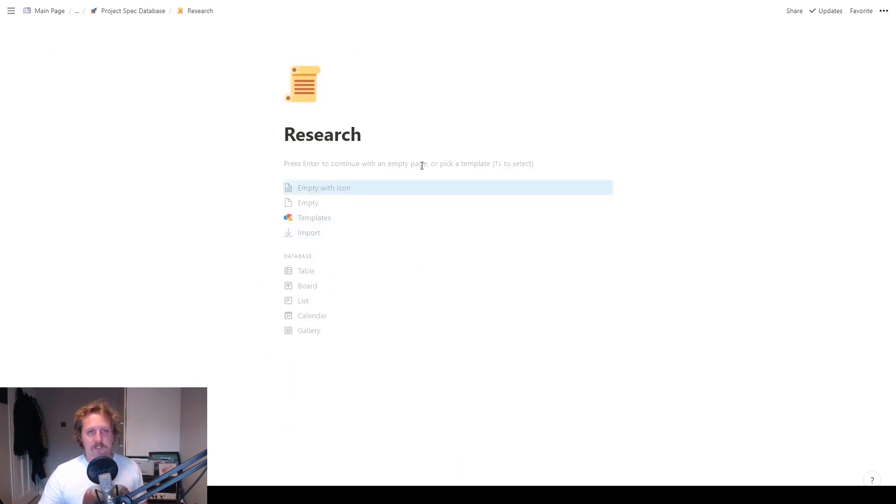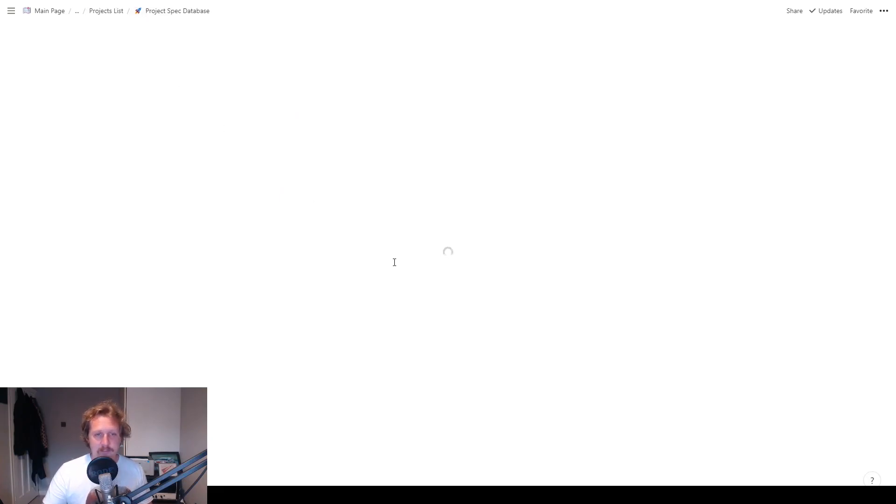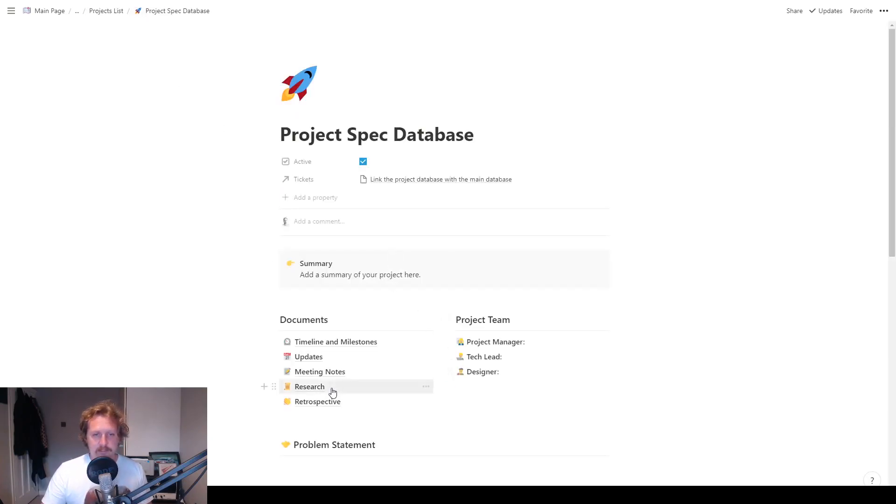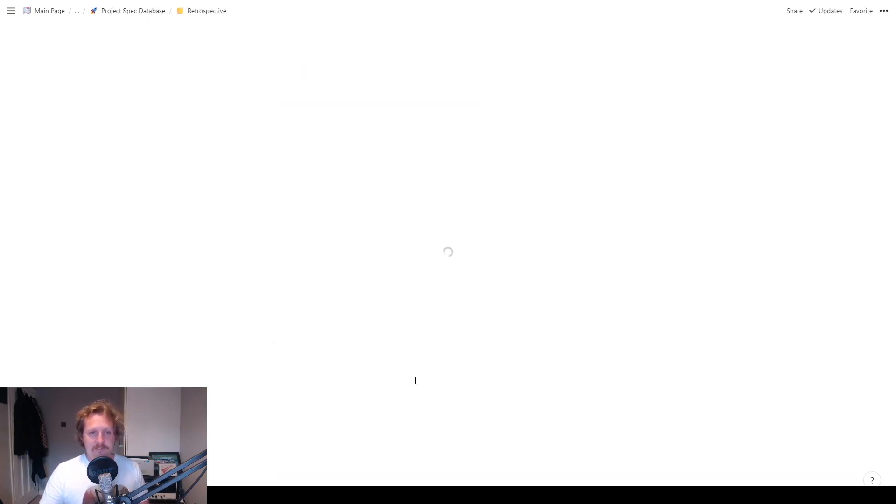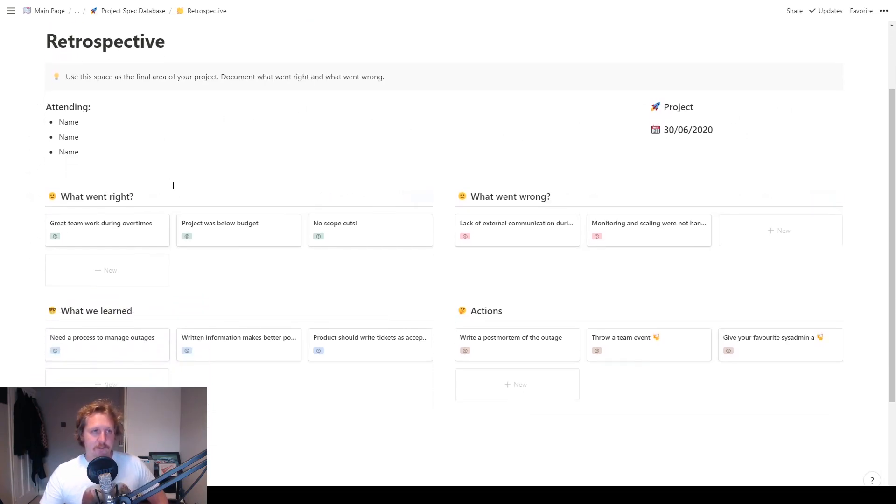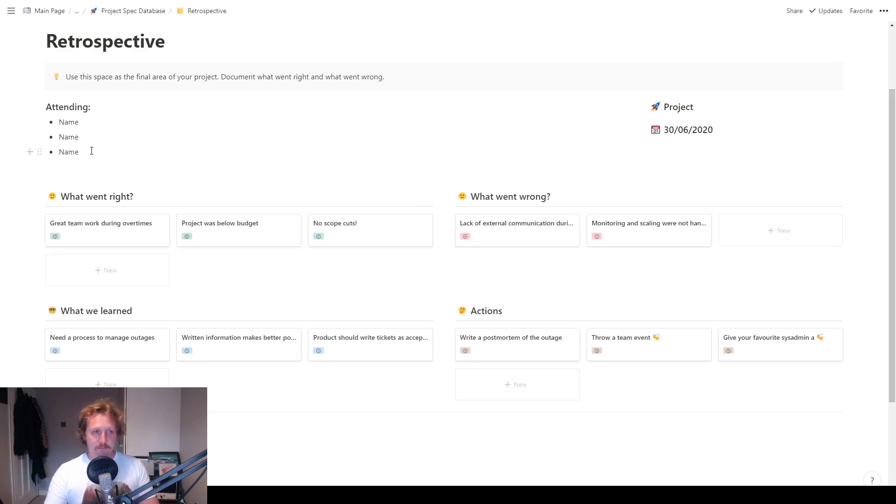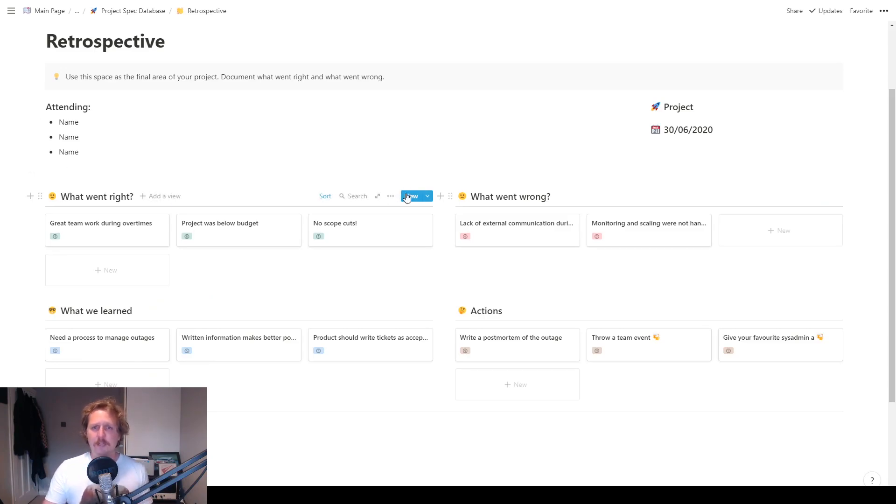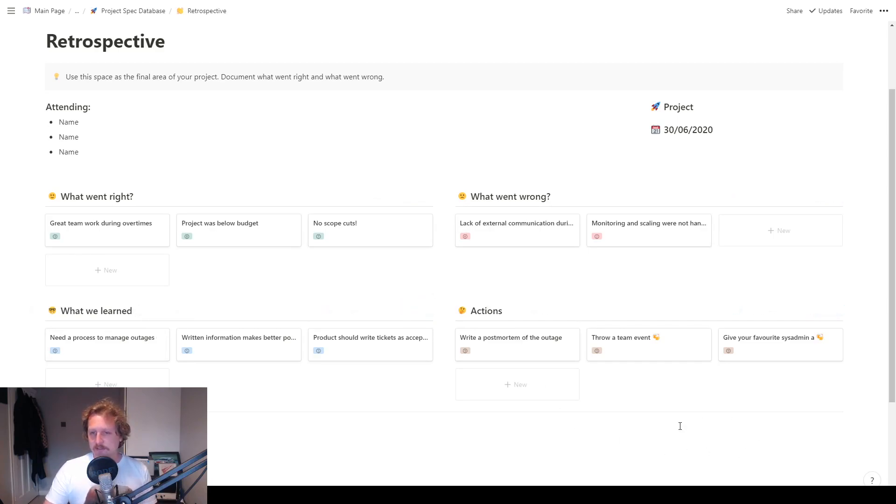Research. So nice blank page, put all your research in here. Super simple. And then the last little bit here, retrospective. So this bit, you would do this at the end of a project. So the project's all finished, all the tickets are complete. You have a nice retrospective. You look back at the project, and you think, what went right? What went wrong? What did we learn? And what actions are we going to take?